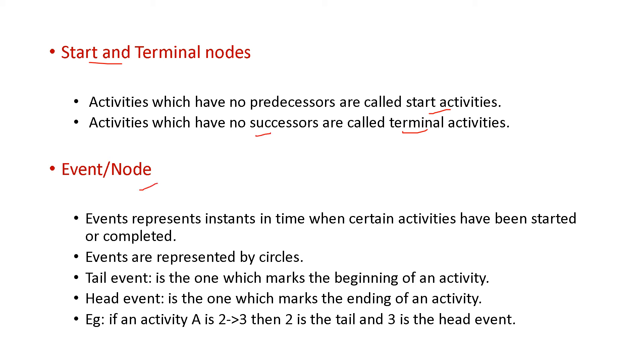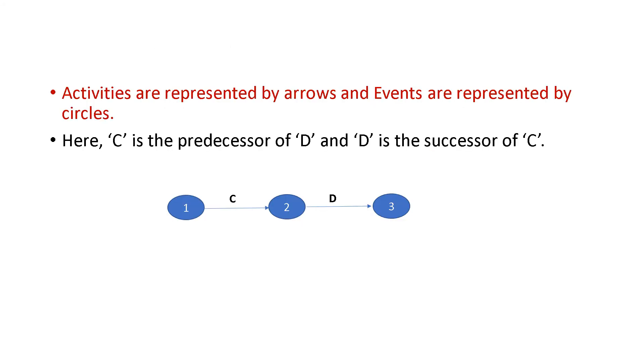Next is the term event or node. Events are represented by circles. In the previous example, we have seen two and three are the nodes. Two is a tail node and three is the head node. Tail is the one which marks the beginning of an activity and head is the one which marks ending of the activity. That is it is moving forward. So head. So that is but that is the end of the activity. That is that are the events and the nodes. Activities are represented by arrows and events are represented by circles.